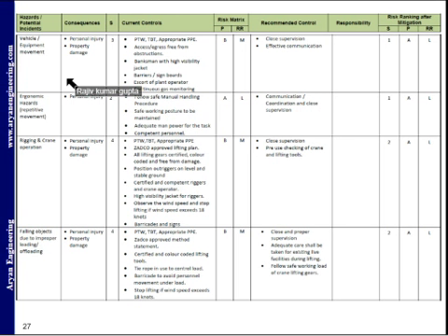So what are the consequences? What are the risks? That is personal injuries and property damage, because we are working in the oil and gas sector. Ergonomic hazards are personal injuries, and when you are using rigging or crane operation, what are the risks? That is personal injuries and property damage. Falling objects due to improper loading or offloading cause personal injuries and property damage.